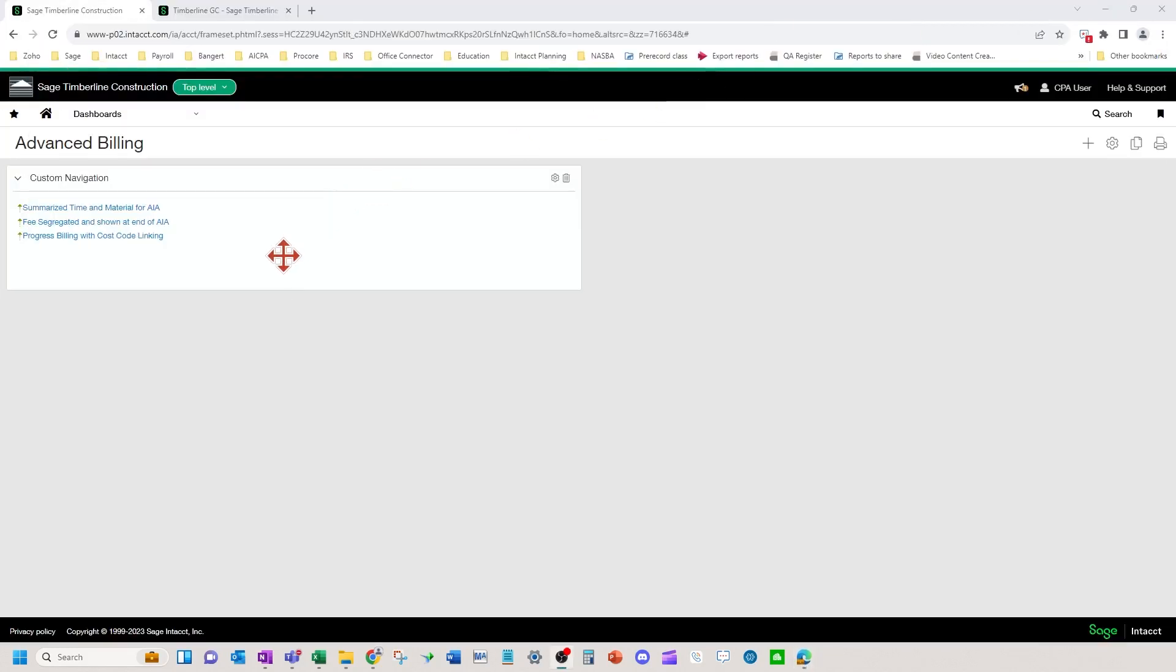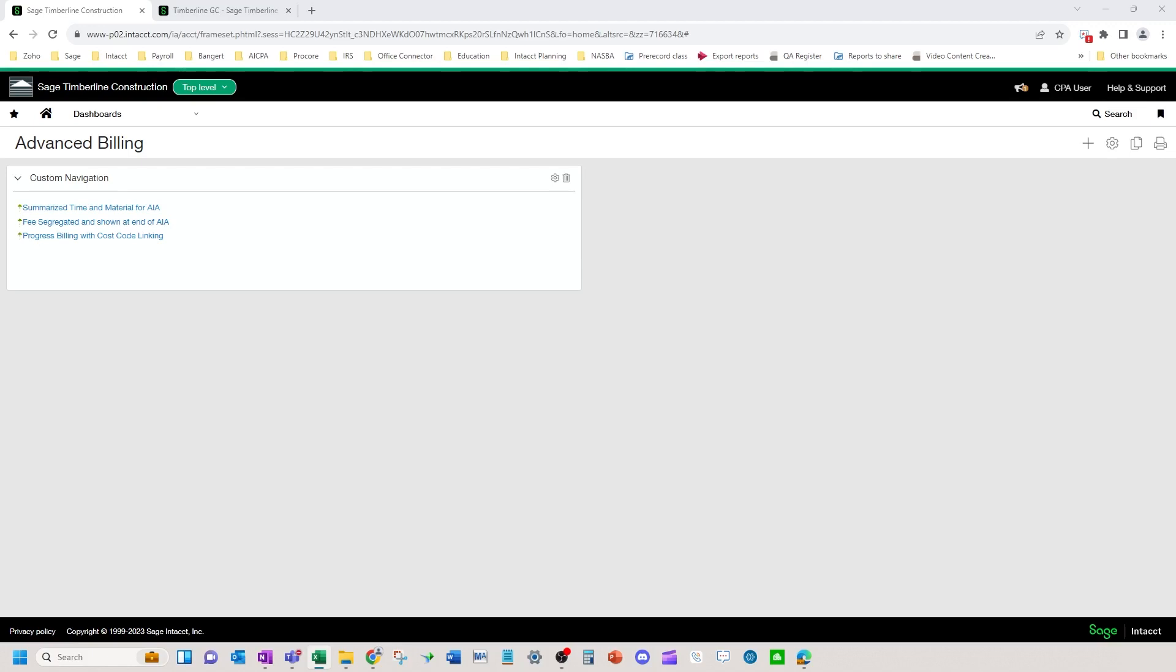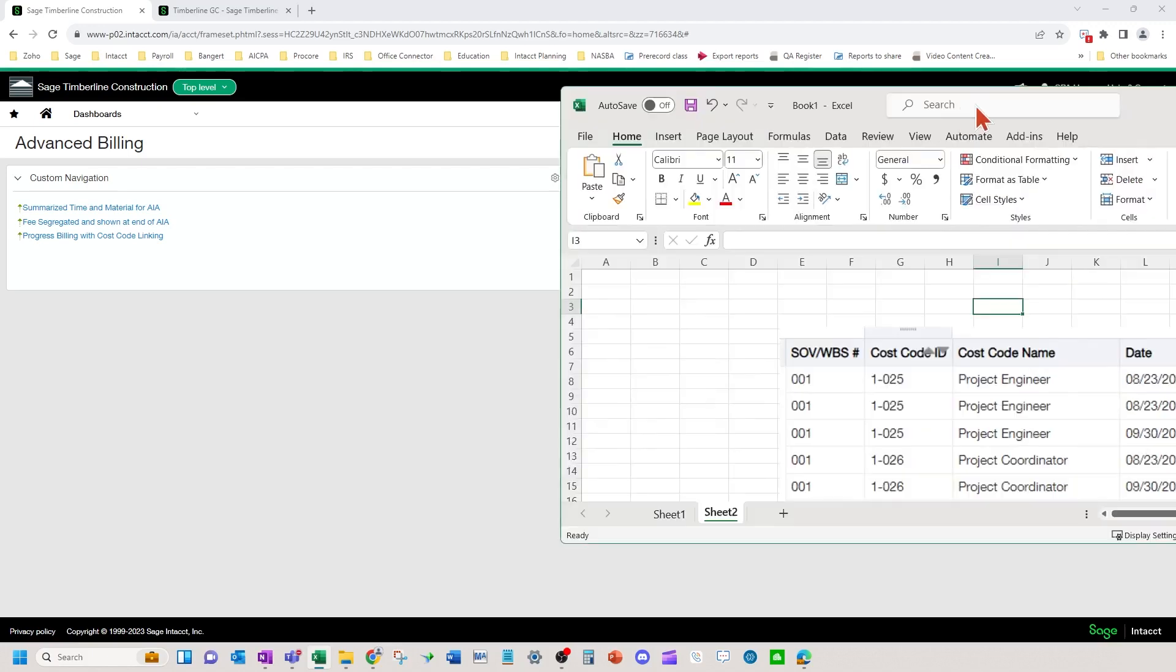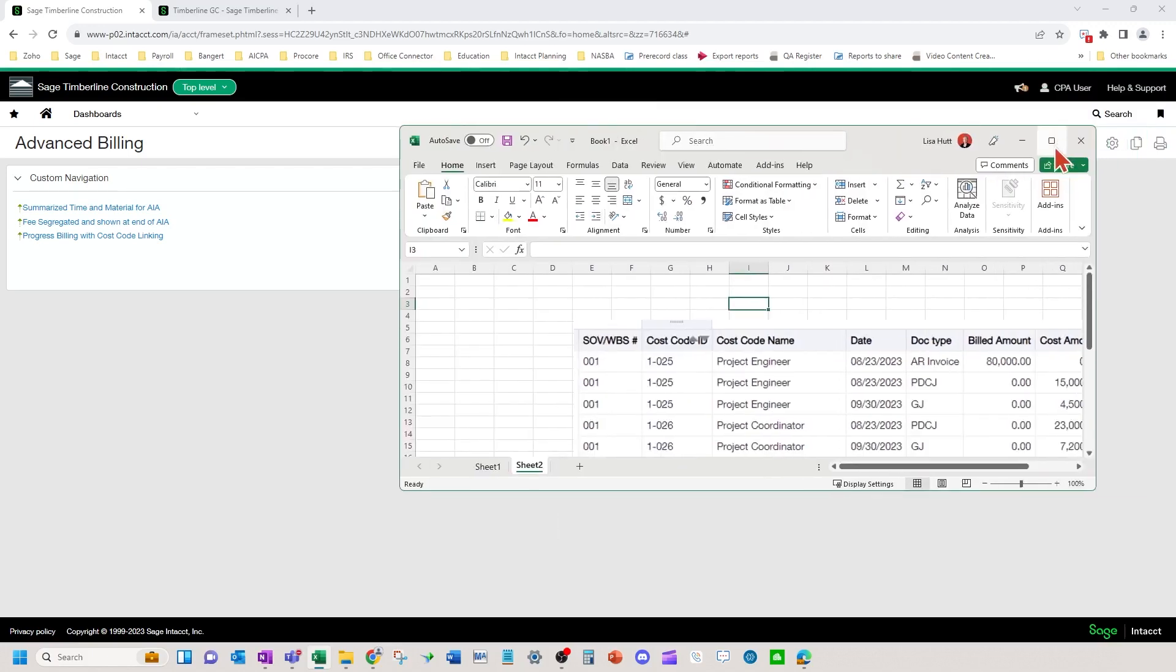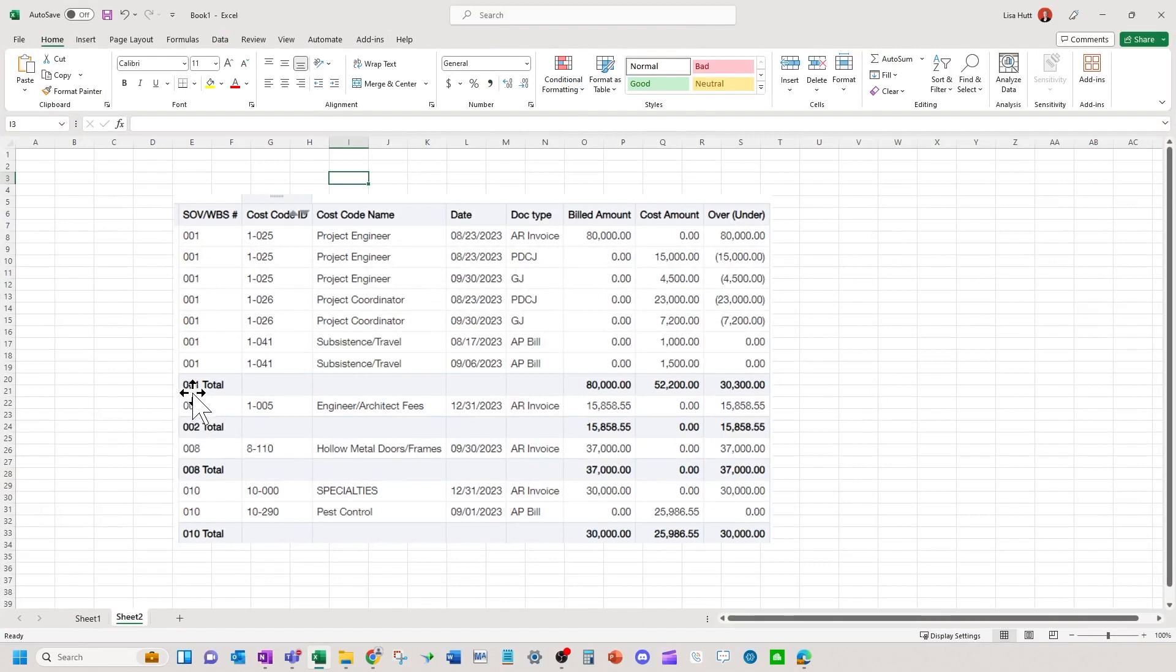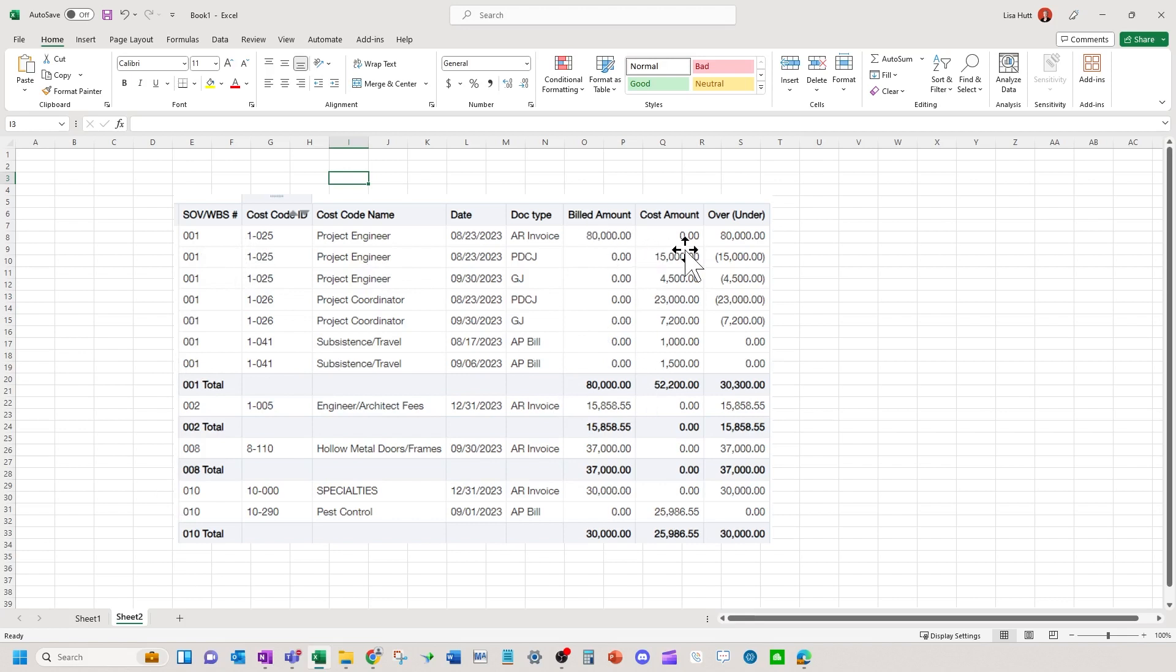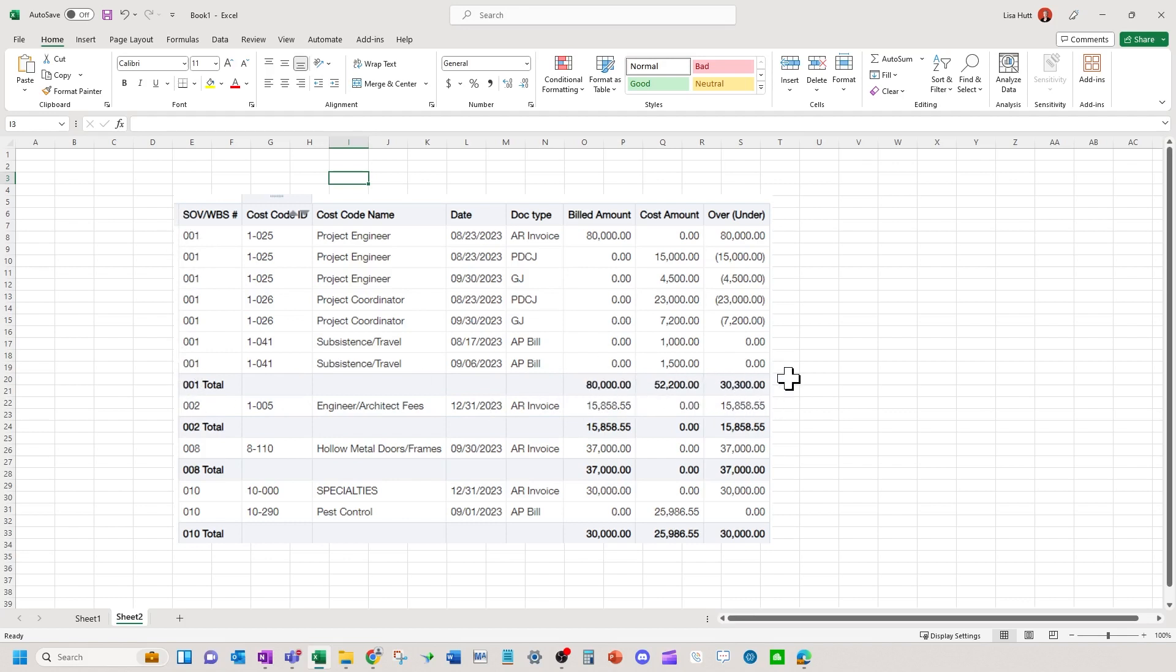So now let's look at the progress billing with cost code mapping. So the effect of this at the end of the day is going to be a report that will show you your schedule of values line number. So if you have 01 for your schedule of values line, 02, 03, all the way down, the schedule of values line will be billed at 80 grand, but here's the related costs. So this report can be built so that it will show what you billed for line one, schedule of values line one, what your costs are in your over, under billing amount. So the end of the day, we'll come back to and look at this at the end, but this is what this solution will do.